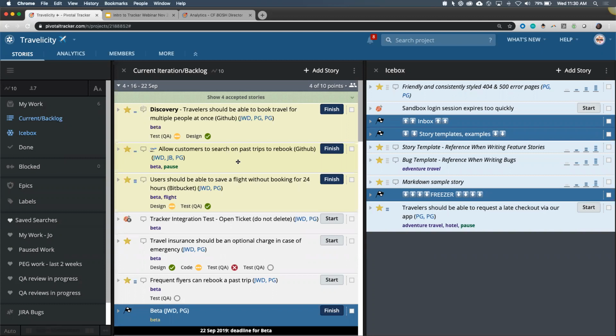When we're at the IPM, the iteration planning meeting, creating the story, part of when we size the story, we create the reviews right then. We say, what reviews are we going to need on this story? And we have a support type if we need that. We have a documentation review if we're going to need to review the documentation, like if we're going to need to review the help center. But we create them all up front.